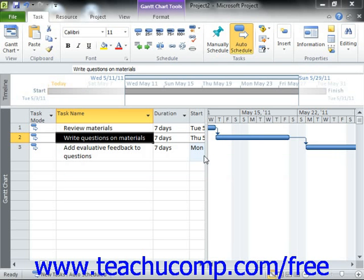Flexible constraints, which are used for task scheduling by default, allow for tasks to be scheduled without any date-restrictive limitations, with the exception being the starting or ending dates of the predecessor and successor tasks within the project file. When you use a constraint type such as "as soon as possible," you are using a flexible constraint.